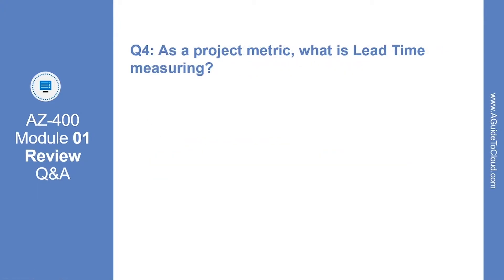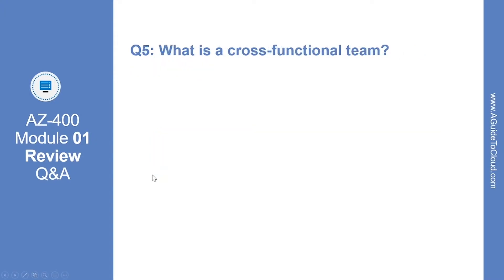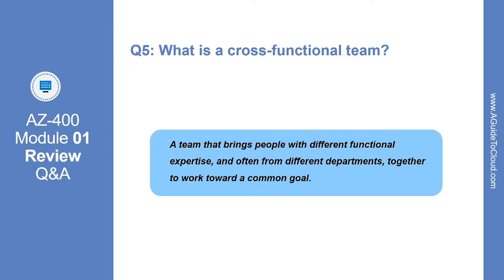Question number 4: as a project metric, what is lead time measuring? The right answer is lead time measures how long it takes from starting on a work item until it is deployed. Question number 5: what is a cross-functional team? The correct answer is a team that brings people with different functional expertise, often from different departments, together to work towards a common goal.